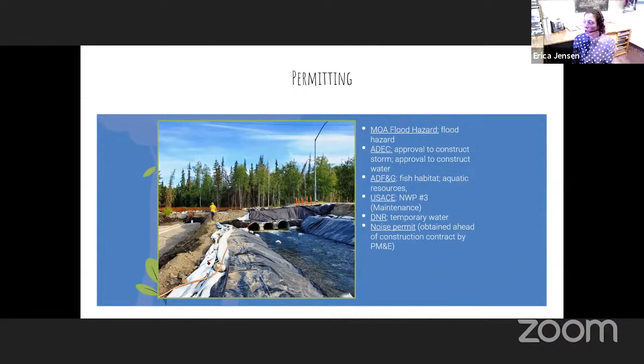Alaska Department of Fish and Game, they had a couple of concerns. One was there was a concurrent reconstruction of the culvert at Arctic, same creek. So they were concerned that there would be two obstacles to fish migration with these concurrent constructions. We had to look at the out-migration of rainbows, which run through mid-June, and then adult coho salmon migration begins in mid-August. So we were allowed mid-June through mid-August for our diversion. That luckily gave us a little bit of leeway to set our 30-day closure, because we had about 60 days for the diversion allowance, which would either way fall within the 30-day road closure.